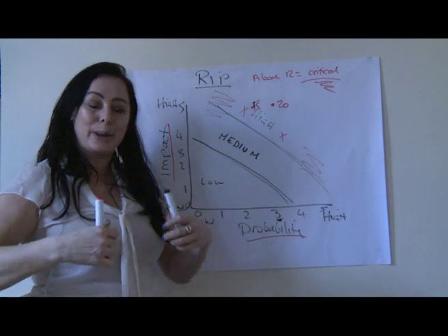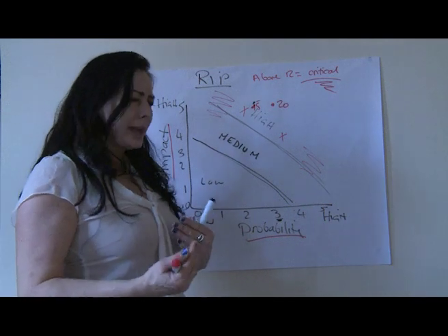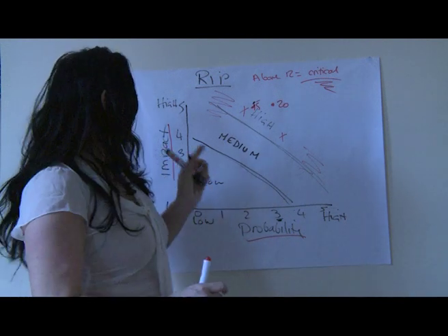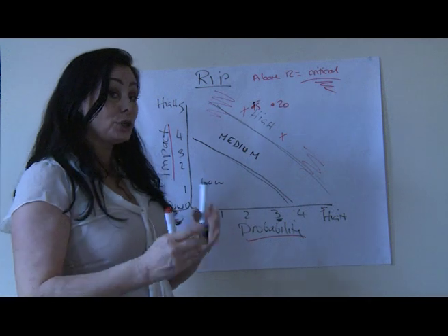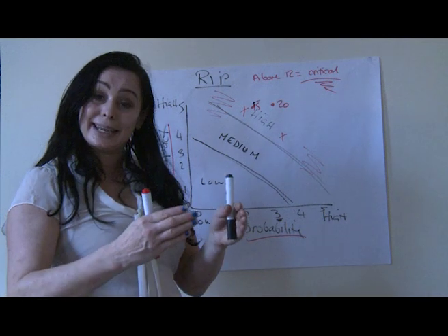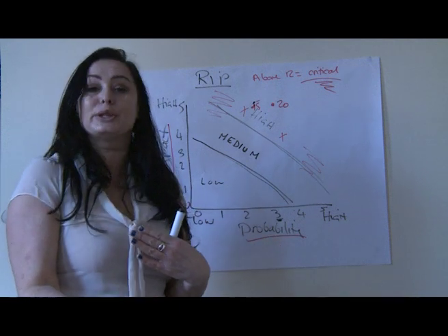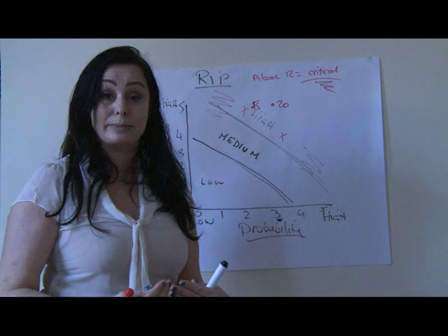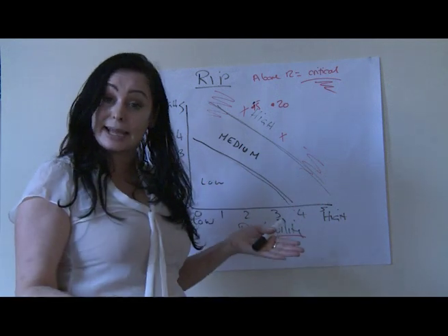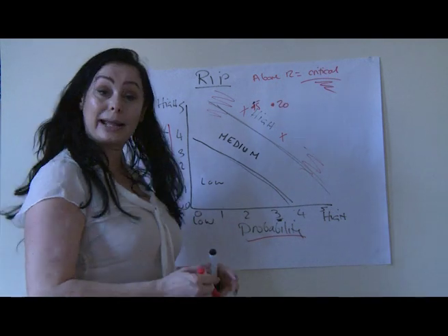So in terms of then putting a contingency plan into place, what if the trainer was off sick? So with this one, you may want some preventative measures, but obviously if the trainer is off sick, you may have to reschedule. But what further impact could that cause? Perhaps you could do some preventative measures and think about having the training filmed and then just have a facilitator to facilitate the activities during the training. So therefore you don't lose any of your reputation or the training that happens, and it doesn't cost money. So then you could pull out pretty much anybody from your organisation just to facilitate the activities, or you could cross-train some other people within the organisation to be able to carry out the training.